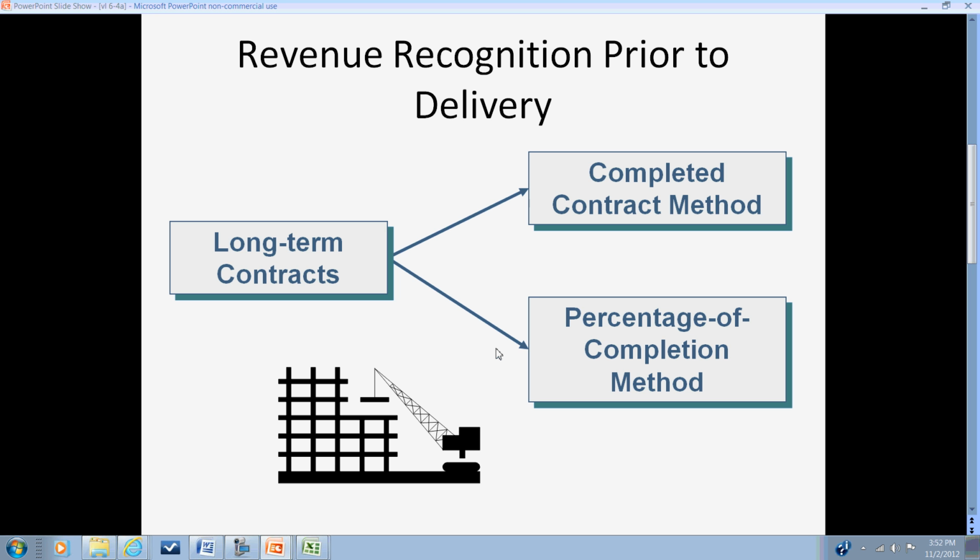And since the contract at that time had been underway for 15 years with no sign of completion, they had never recognized the income derived from those projects, even though they billed and collected on them. That was one of the types of projects that raised the attention of the Internal Revenue Service, and in their regulations, they now require companies to use the percentage of completion method unless there are extreme circumstances, and the company has to apply and get approval for the completed contract method.